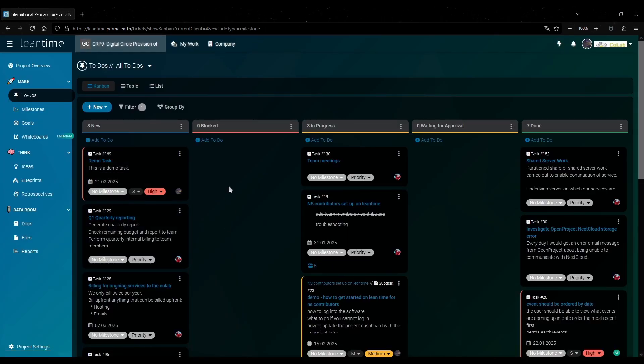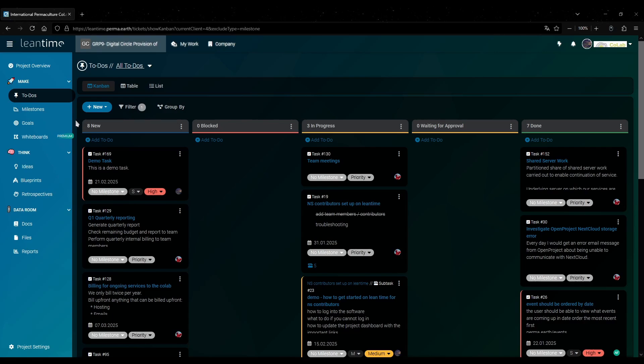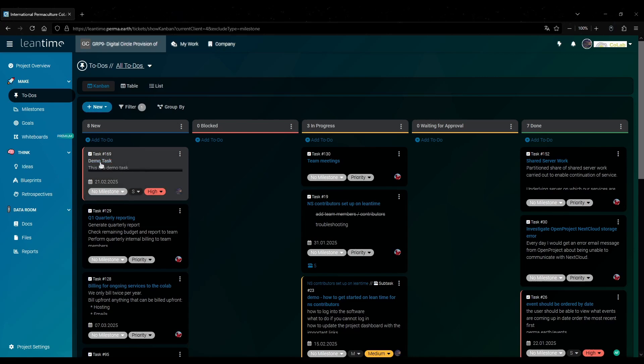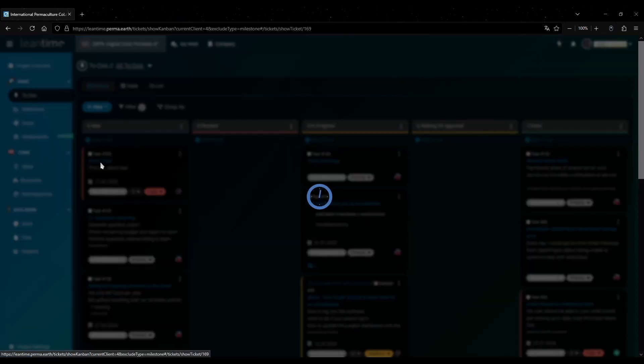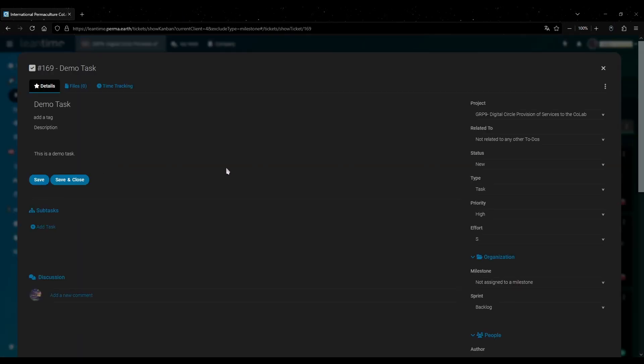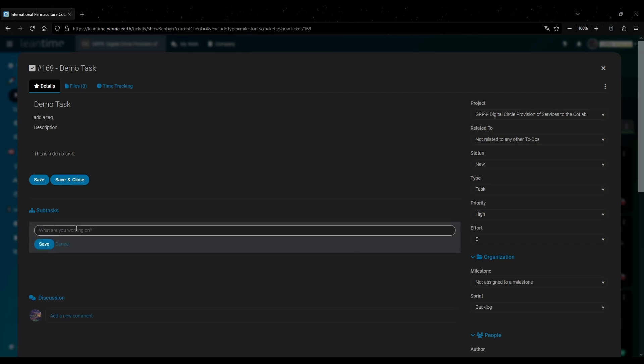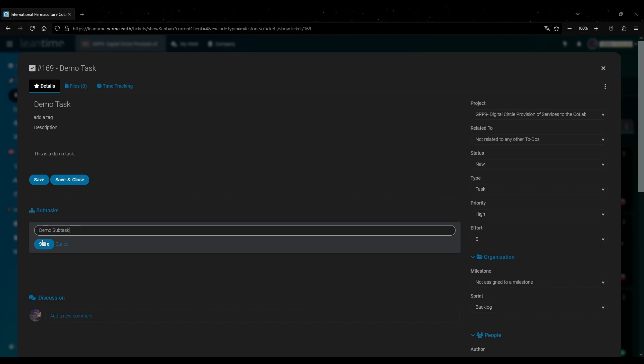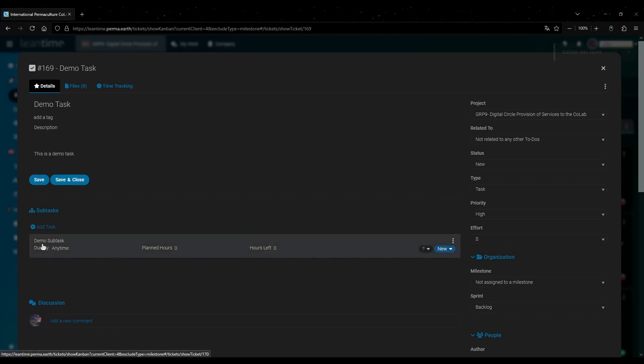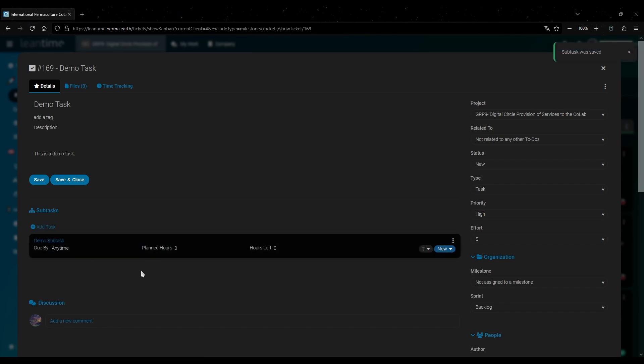Next I will show you how to add a subtask to this task we just made. Instead of clicking new you actually click on the parent task for this. Then on the left here add task. And then give it a name. And now you have created this task as a subtask.